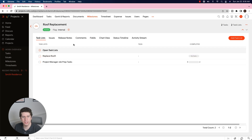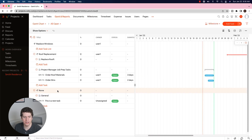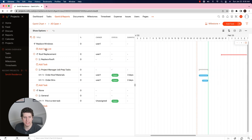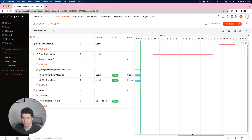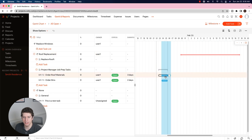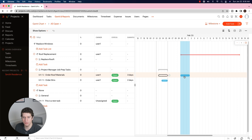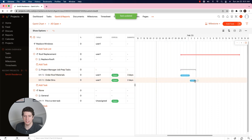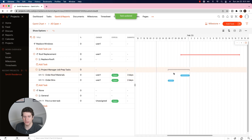Once we've finished putting in our milestones, task lists, and tasks, one of the really cool features is the Gantt chart. This Gantt chart is handy because it shows everything within your project. The Roof Replacement is set to run from the 30th to the 18th. However, the tasks created were set with dates prior to the project even starting — a mistake — which can be fixed by moving the tasks around to change the dates.